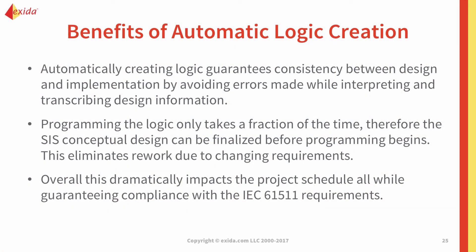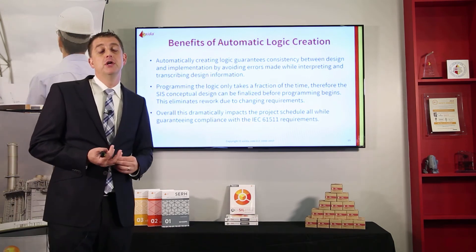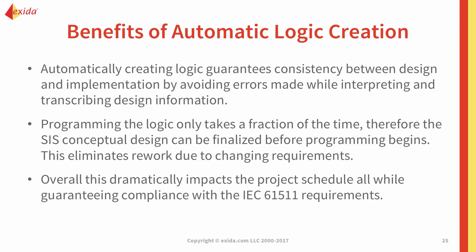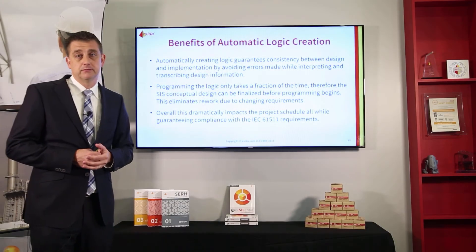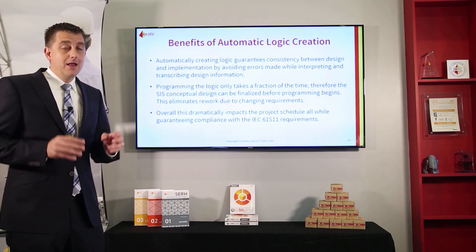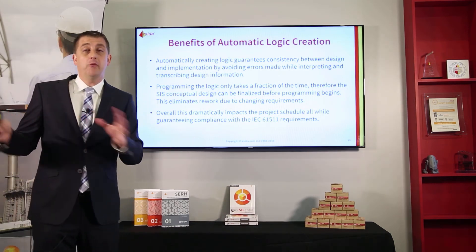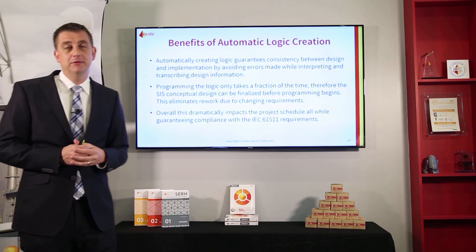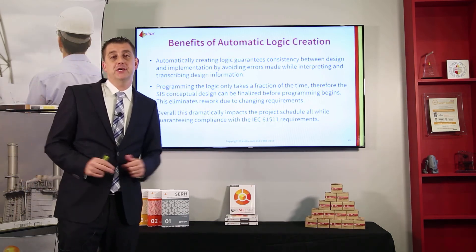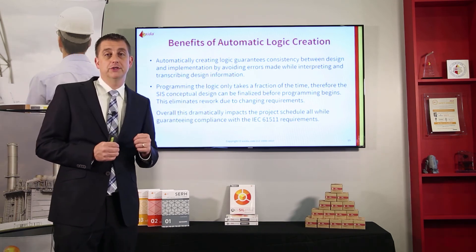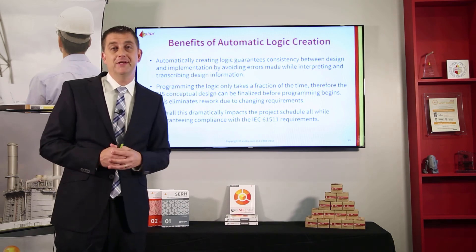There are obvious benefits to automatically creating your logic. Consistency: instead of having multiple engineers implementing logic differently, it's always the same consistent approach. It's also a fraction of the time — at a trade show demo, a gentleman told me that what I did in five minutes took him six months. Many projects start implementing logic in the logic solver way before the upfront design is done, before all the safety requirements are specified and the conceptual design is evaluated, due to project schedule pressure. You then have to do rework because original assumptions are no longer valid.